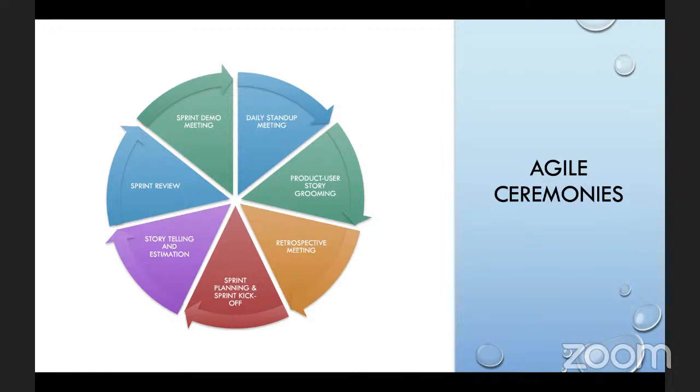Now, I've worked on a similar feature before in the past. We're going to need this vendor to provide this for us. We'll have to provision this before. We'll have to do some database tags for this as well. After that, we'll have to work on this endpoint's GET method. So he will explain to us why, and all of this will take time. And so this is why he's saying this is going to be an 8-point story.